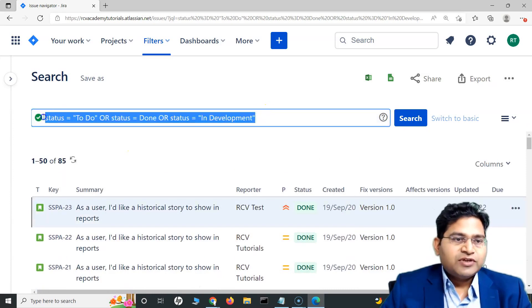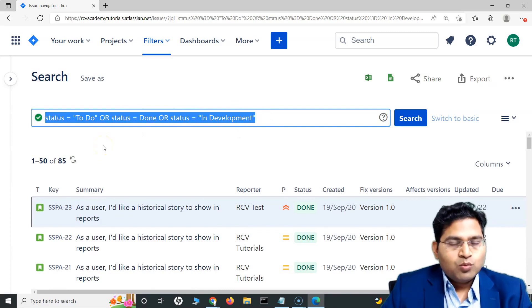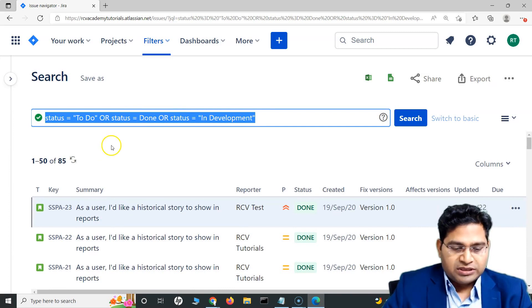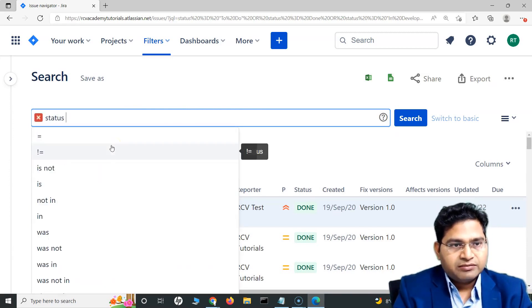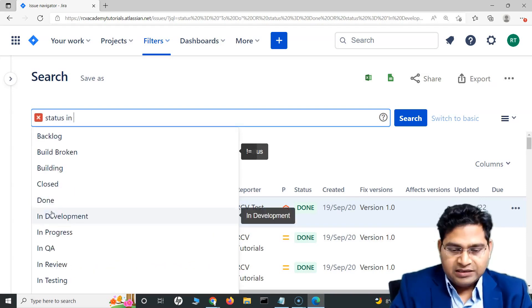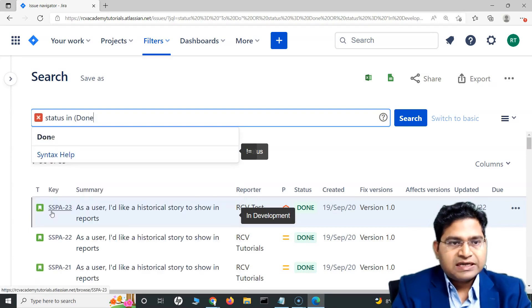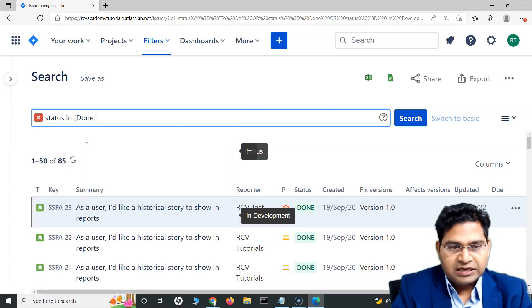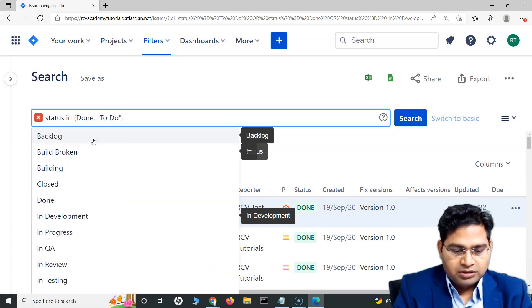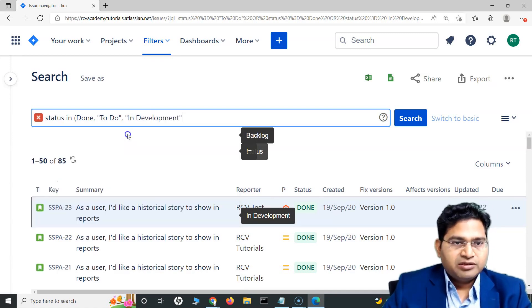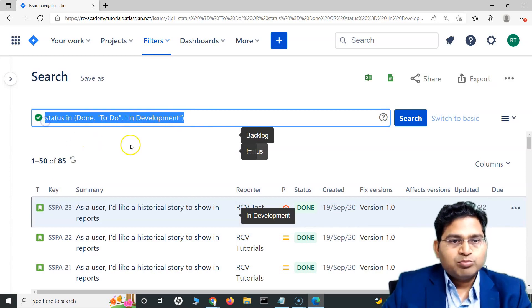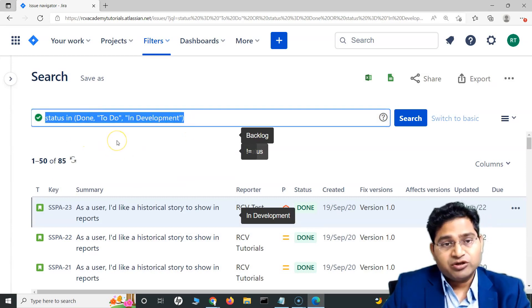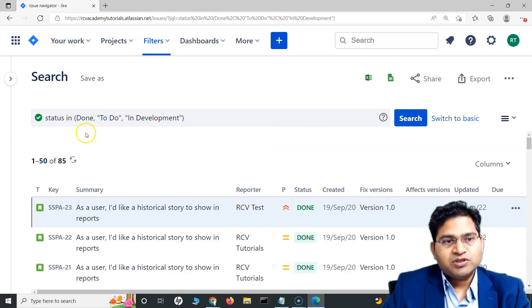Now, is this very efficient way? No, this is absolutely not an efficient way. Now, with the in operator, I can basically do this very quickly. What I can do is I can say status simply use in. I can say status in and in the bracket with comma separated, I can specify what all status I'm looking for. I'm looking for the issues that are either in done or in to do or in development. If I write this query, this is much more readable and small as compared to the previous one. If I'll search this, you will see the result is absolutely same.